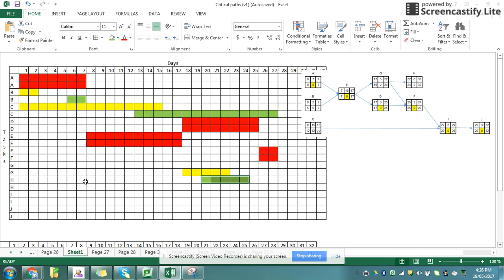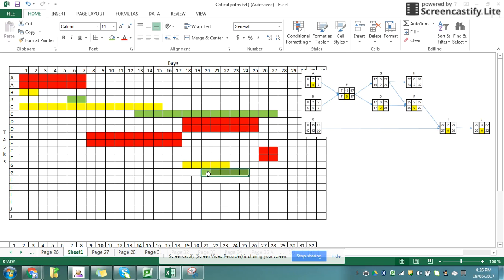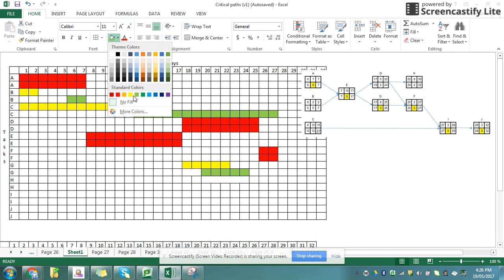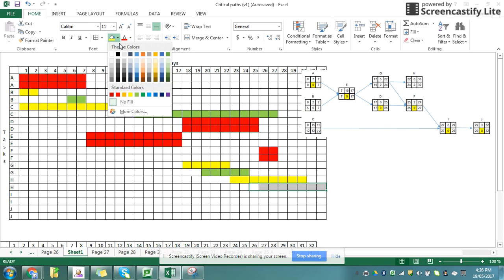Task H. I think I've gone out of line there, so I'm just going to quickly move those back up. Got to be really careful with this. Task H starts at 22 and finishes at 30. And could start at 24 and finish at 32.